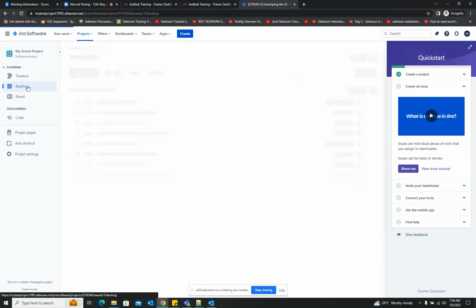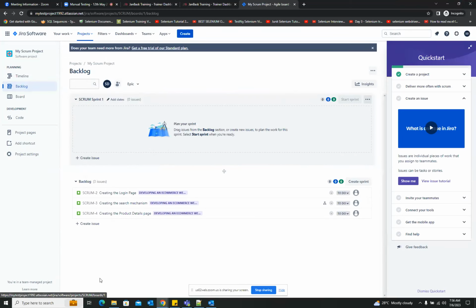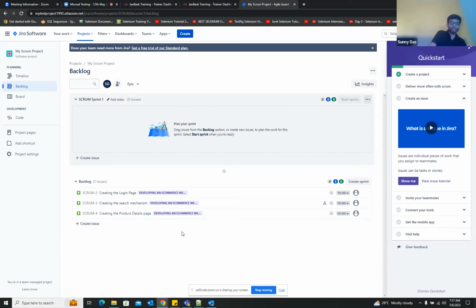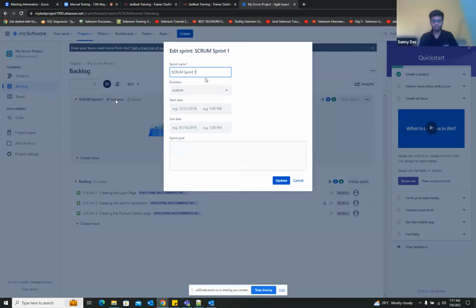Now, if I go to backlog, you see all these things that we are creating. All these are coming as the backlog items. So now what we can do, we can create a sprint one. Okay, we can add date. So maybe this is the sprint one. The duration would be 2 weeks. Now the start date is today.